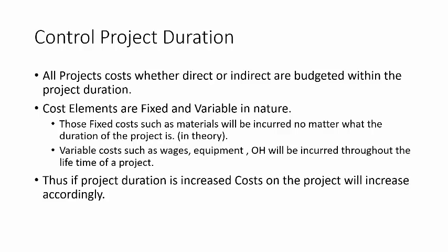The reason I'm touching on this duration issue is because currently we're just looking at two variables when we're doing the reporting in PCD and of course finance. We're looking at the budgeted cost and the actual cost. There is no element of duration in the picture. And the fact is, these numbers are coming after the fact. So this is called being reactive to overcost in a project. We need to be proactive.